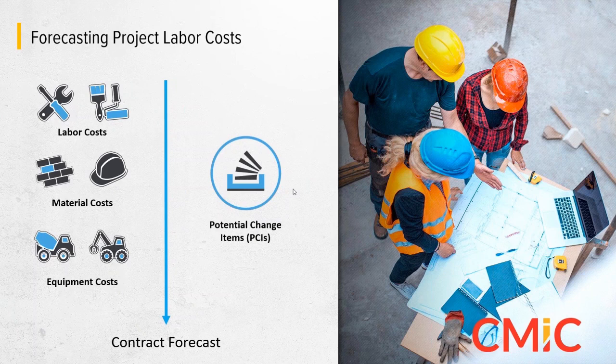And that's a huge value because all of those mechanics that Imran was showing give us the ability that, depending on your business process, you could actually post timesheets as often as even daily. And that is going to put your project managers at a huge advantage from an operational perspective so that you can see up-to-date labor costs as forecasts are being reviewed, which from a self-perform perspective is massive.